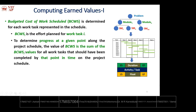The value of BCWS is the sum of all individual BCWS(i) values. For a module, BCWS is calculated by integrating all sub-task BCWS values. This bottom-up aggregation continues — sub-tasks feed into tasks, tasks feed into modules — until we find the BCWS for the top-level element. BCWS is calculated for all tasks that should have been completed by a given point in time on the project schedule.